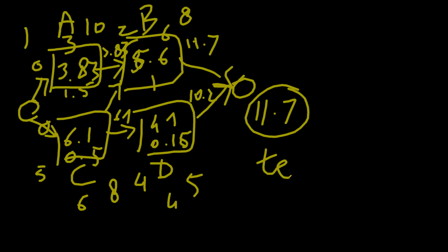Can we calculate the deviation for the whole project? Is it going to be the sum of the standard deviations of all the activities combined? It cannot be done like that. This is the problem with it. The deviations cannot be added like that. The impact of the deviation of activity A would be aggregated onto B in a very different way.